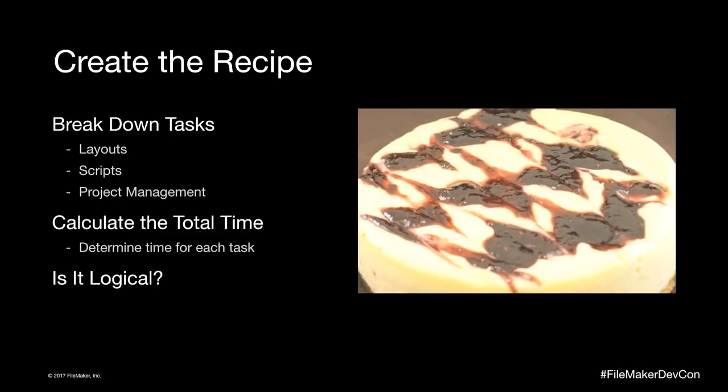So you might think about the whole picture without necessarily breaking everything down, and think in terms of, it'll be maybe somewhere between $20,000 and $30,000 or something like that. So you might start off with the ballpark with the client so that at least they know they're within budget, and then from there you do the breakdown.